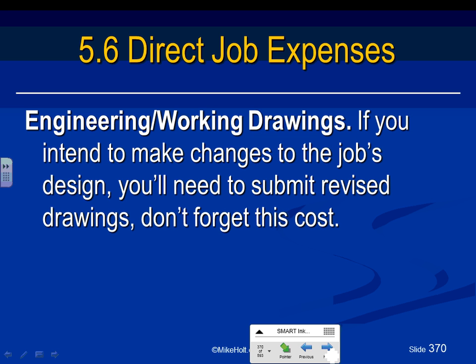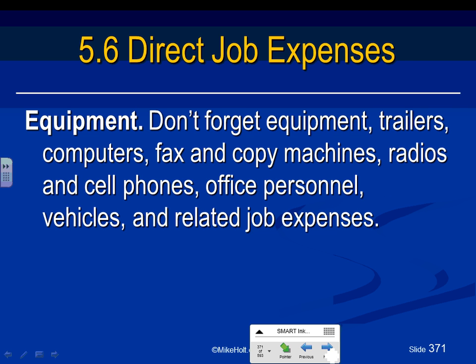Engineering work drawings make changes to the job's design. If you are to modify what the engineers have designed, and you have to resubmit for the engineer's approval, that will take time, right? So you have to accommodate for this.